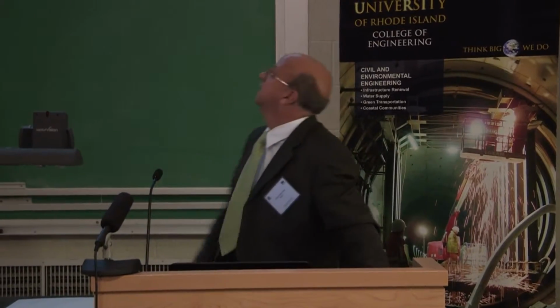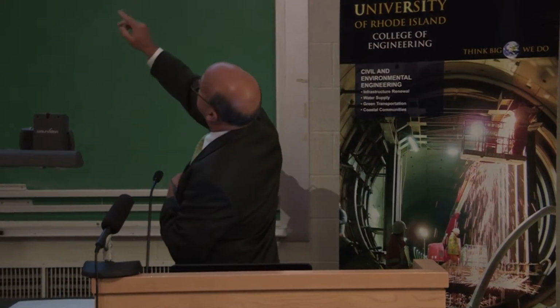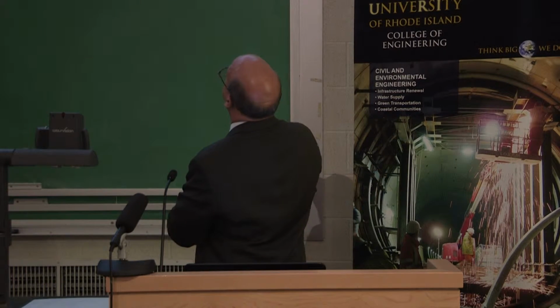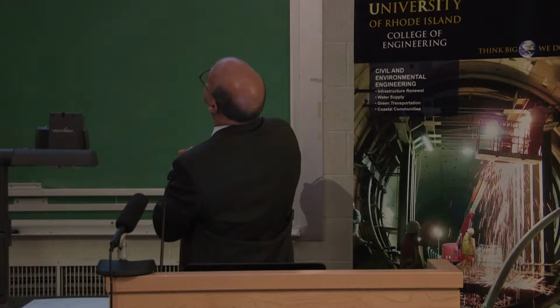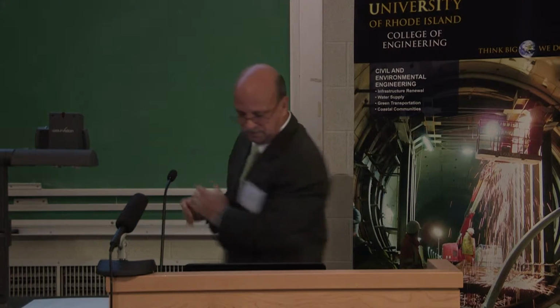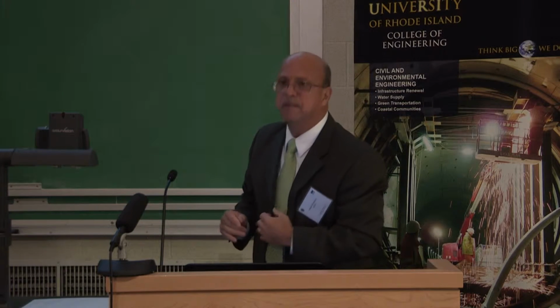This is a diagram of the layout. Piers 4, 5, and 6 were where we used the 72-inch pipe piles. The rest were H piles. And again, 5 and 6 was the center channel. The average depth of the pipe piles is around 160 feet deep.